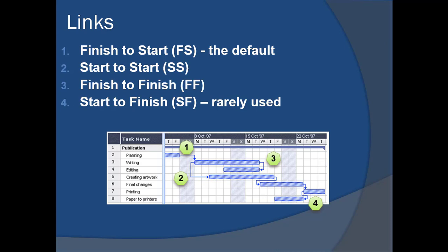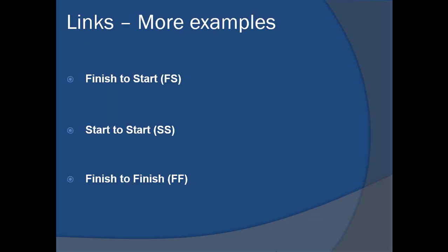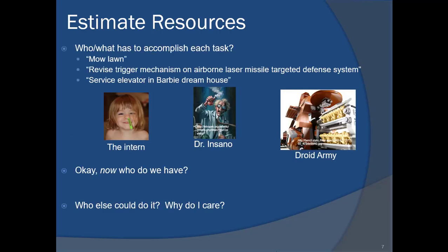All right, so all these are used as far as creating your progression of where this project needs to go and timelining what parts of your work breakdown structure need to get done in certain hierarchical order, and what order they need to go into, what needs to start before it finishes, what needs to finish at the same time, what needs to start at the same time, etc. So like I said, finish to start is something has to finish in order for another thing to start. Start to start means these things have to start at the same time, and finish to finish means these things have to finish at the same time. In a nutshell, it's just part of the process. Those are the different examples.